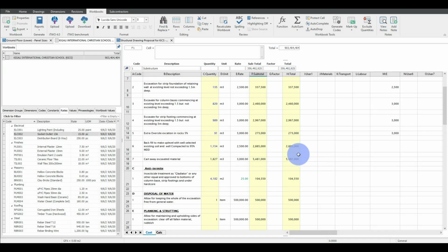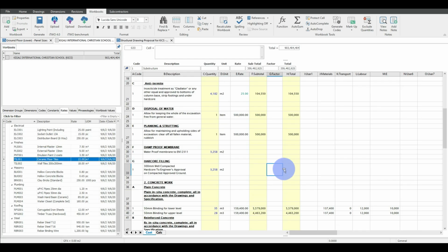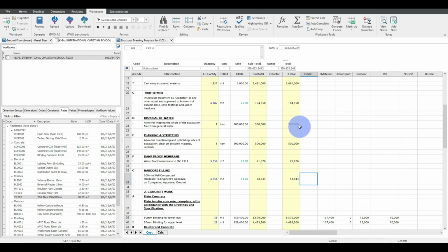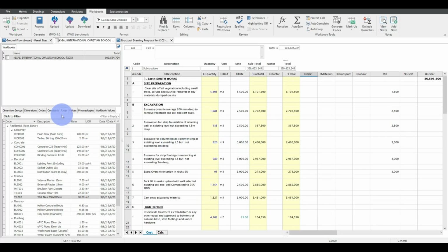So when you have the rates, what you do is just drag and drop, then you update. You see, it updates. Just drag and drop, then you update. So it's really amazing work and really advanced work to do the job. I will teach you also how to make this automatic Excel import of the rates without you typing, when you have them already from your previous projects. So I'll teach you how to upload it in the CostX so that you can be using it to prepare the BOQ.